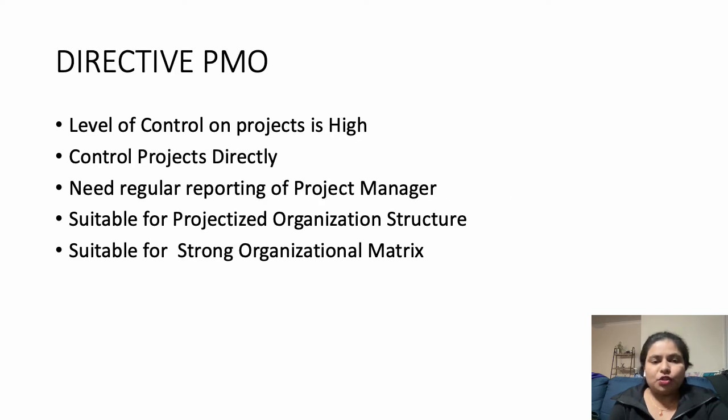Unlike the other two types, the directive type PMO has the highest degree of control on a project. In this type, PMOs control projects directly with full control by directly assigning project managers. The project manager should report to the PMO on a regular basis. This type of PMO is followed for projects that are highly critical and need full attention to follow strict standards.